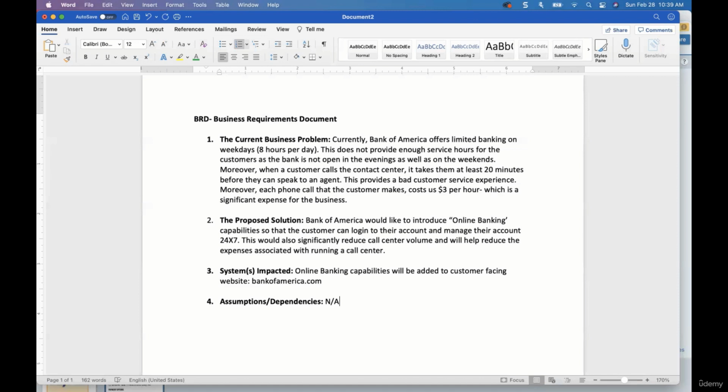So when you're writing requirements for such a project which has integration with a third party, your assumption or dependency is: we'll only be able to take care of credit card payments as long as we get authentication from Alberta Payments. If that's down, you're done, because that's something you cannot control. So that's an example of an assumption or dependency. Got it?